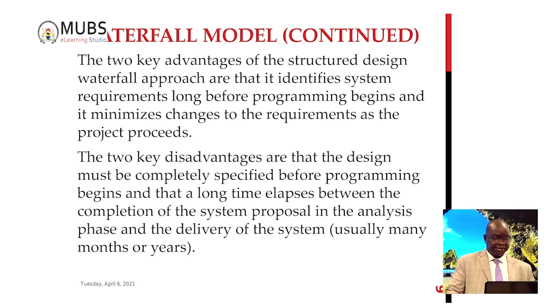So the two key disadvantages are that the design must be completely specified before programming. So this may take a very long time. Planning and analysis may even take a year or more before any coding work can start.